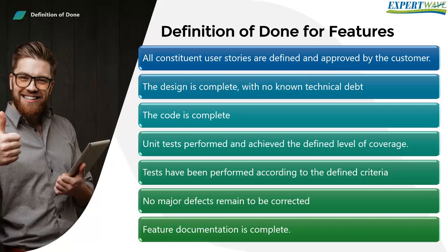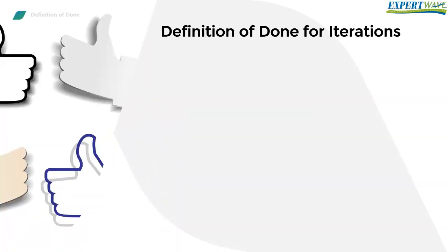Unit tests have been performed and have achieved the defined level of coverage. Integration tests and system tests for the feature have been performed according to the defined coverage criteria. No major defects remain to be corrected, and feature documentation is complete, which may include release notes, user manuals, and online help functions.